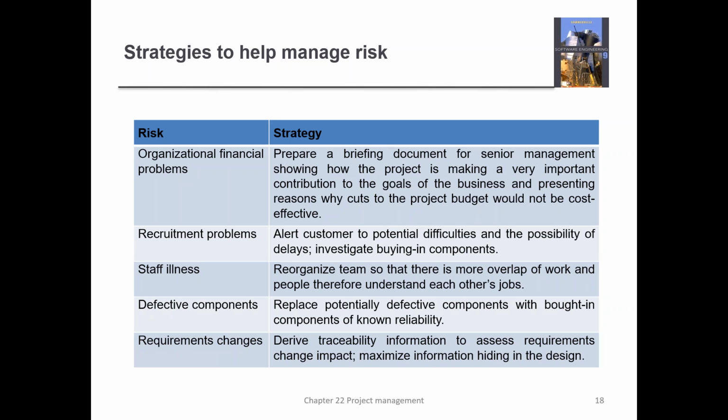You should do your testing. So you should be able to replace the potentially defective components with bought-in components of known reliability. Those with known reliability may cost a little bit more, but push come to shove, you're going to have to use them to replace the defective ones.